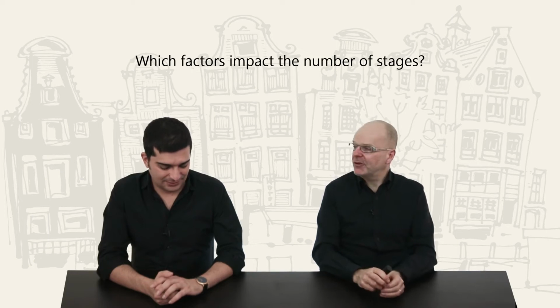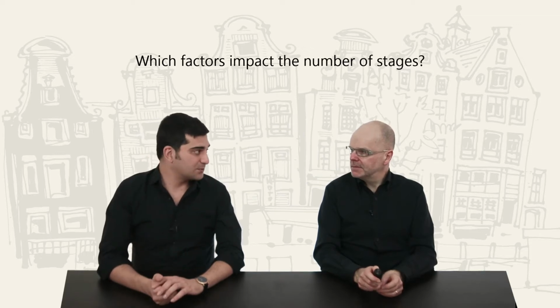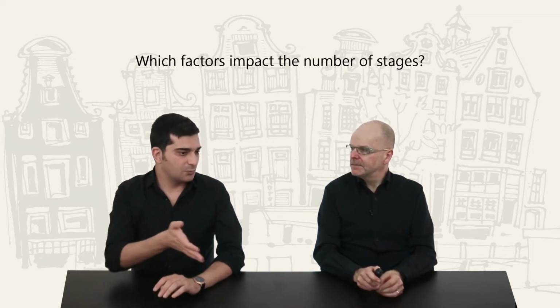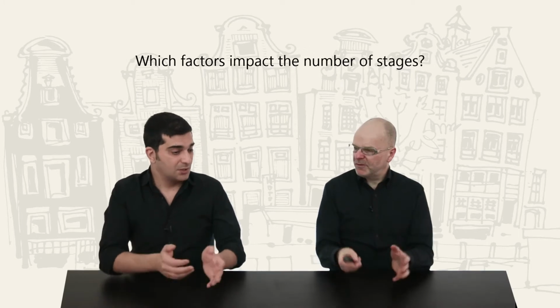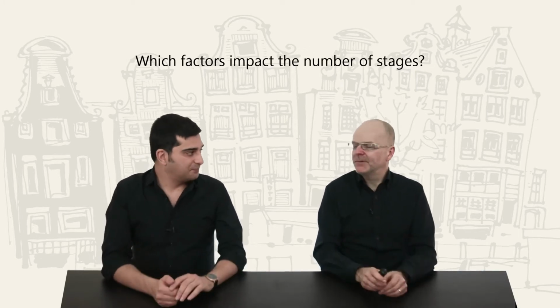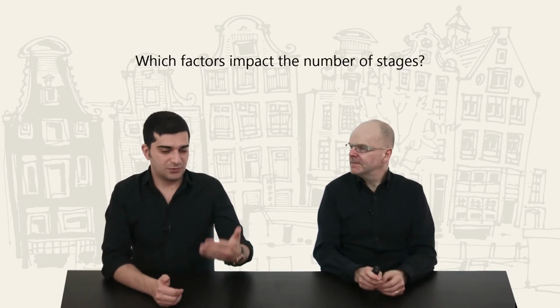Okay. The project risk, will that? Oh, sure. Yeah, when risks are higher, we need to have more controls to make sure which way we are going and what's happening to the project. So more controls means more decisions. More stages. Yeah, more decisions. Okay. For example, maybe we have to stop the project.